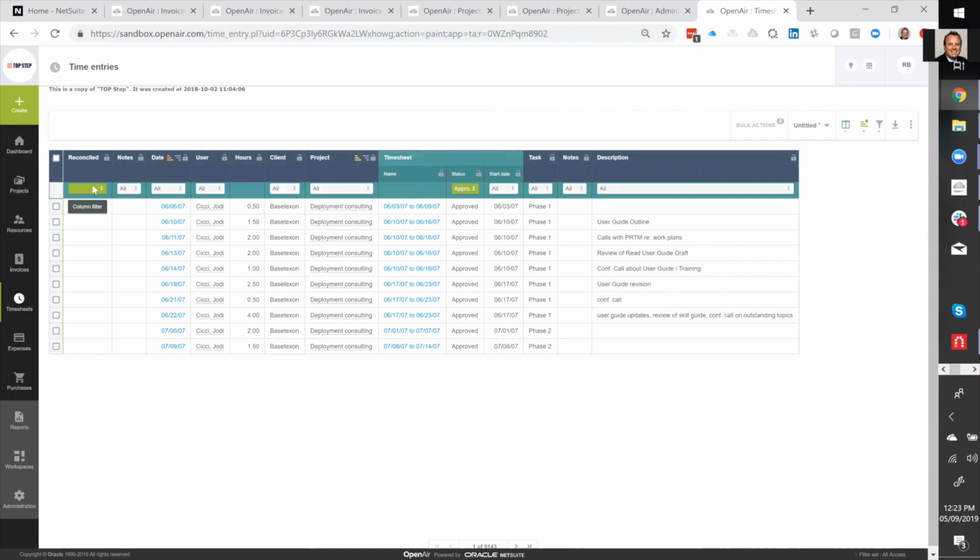And then what you do is once you have that set up, you create the different values you want to be able to use in the drop down field for the reconciled. So in this case, we have invoiced, open, and paid, but you can have any drop down values here based on what you're using this for. And so I could say, okay, Jody sent me an invoice, and I can go through and see, okay, here's the hours that Jody entered for the period in which that invoice applies to. And I can say she went ahead and invoiced me for everything, but the 9th was not on her timesheet. I'm sorry, on her invoice. So then I could say, okay, I'm going to go ahead and mark everything else as paid.